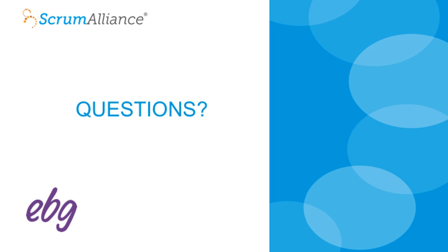And if you're doing refinement to prepare for planning a release, and it's a very big release with multiple teams, and you're doing discovery in a very large room, whether it's real-time or distributed, it could be a day or half a day. So part of the answer to that is what is the planning horizon you're looking at?